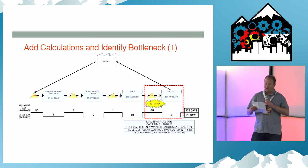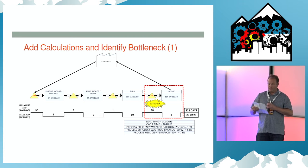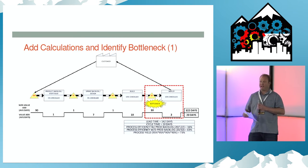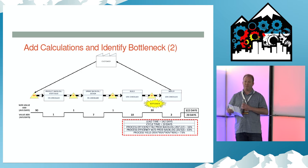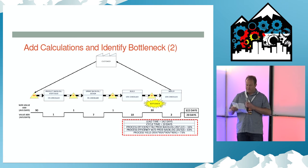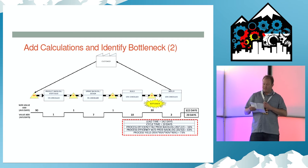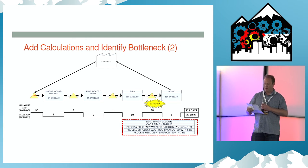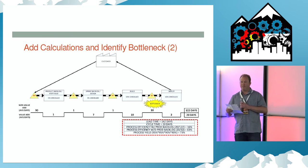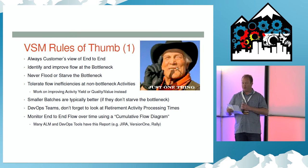The monthly deployment window on the far right is the bottleneck here with the large WIP and queue time. Improving any activity before that is just going to stack up work at that bottleneck. If we want to improve our delivery speed, we really have to address that deployment bottleneck first. The efficiency metrics show value add versus non-value add time. The 16% indicates we have a big gap with our customer demand rate, and 63% shows that we have a lot of opportunities to improve our work and process flow.